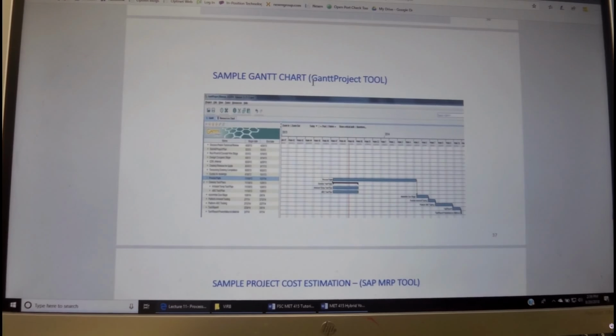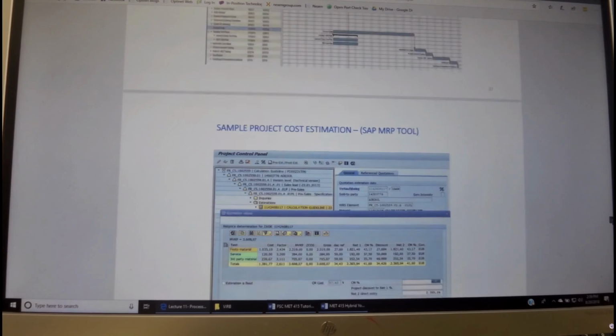You could Google Gantt project and download that for free or for a $5 contribution. And you see over here the breakdown structure of all the tasks. And then you have the start time and the end time. You can expand that and also see the resource. And over here you have milestones and you have the different tasks, how they work along the timeline from the beginning to the end of the project.